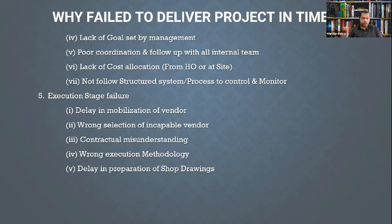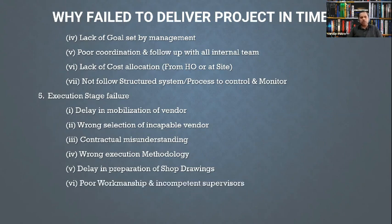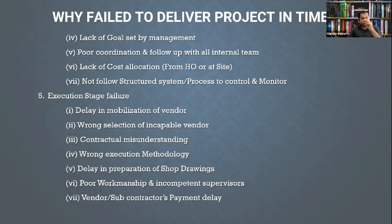The vendor prepares the shop drawing, which then goes to the client, consultant, or main contractor for approval. This approval process can take considerable time, especially if the design team does not have sufficient manpower. This leads to further delays. Other execution-stage issues include poor workmanship and incompetent supervisors.